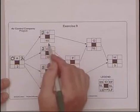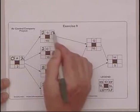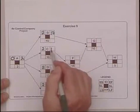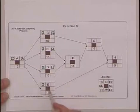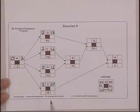Now we simply add the early start to the duration. 2 and 10 is 12, 2 and 13 is 15, 2 and 18 is 20.